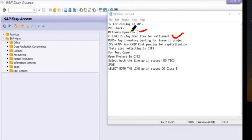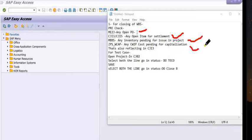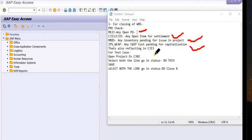In CJI3, you can see all the cost item line bookings — how much cost is booked in your WBS and estimates, with each line item shown. In MBBS, check if any inventory is pending for issuing in the project. In ZPS_WCAP, a customized transaction code for CWIP, you can check any unsettled cost pending for booking in the WBS.